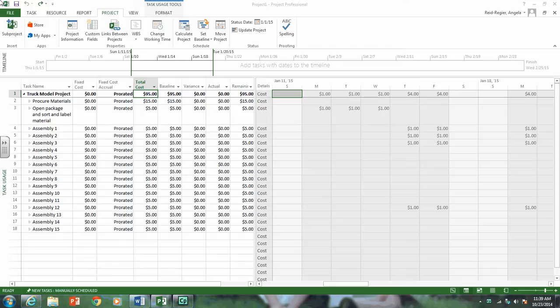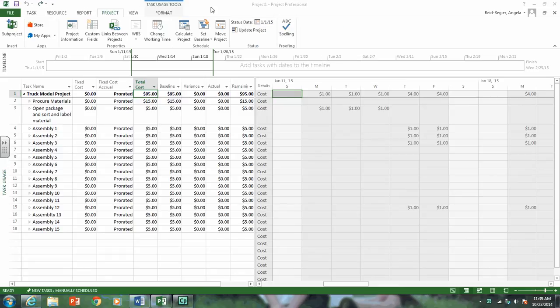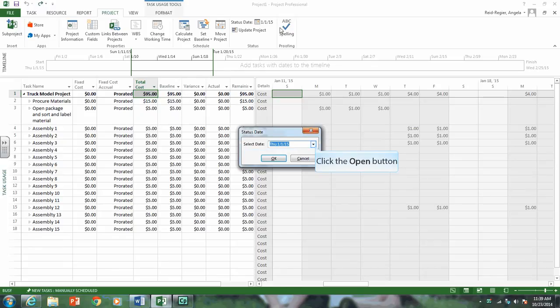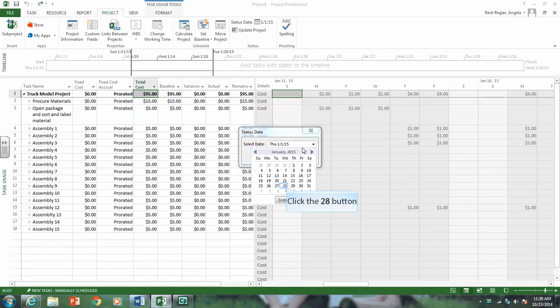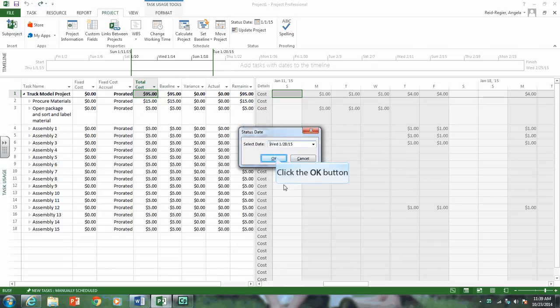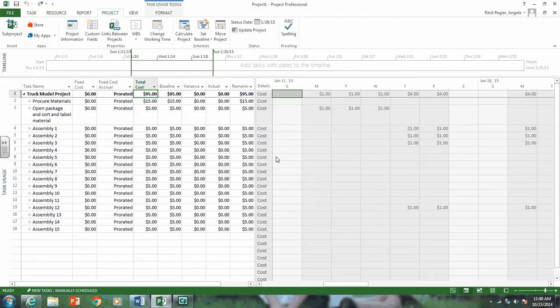As we said, this is status based on January 28th, which is day 20 of the project. To move the status date to that time frame, we go up here and we click it, and we want to change it to January 28th, and we click OK.